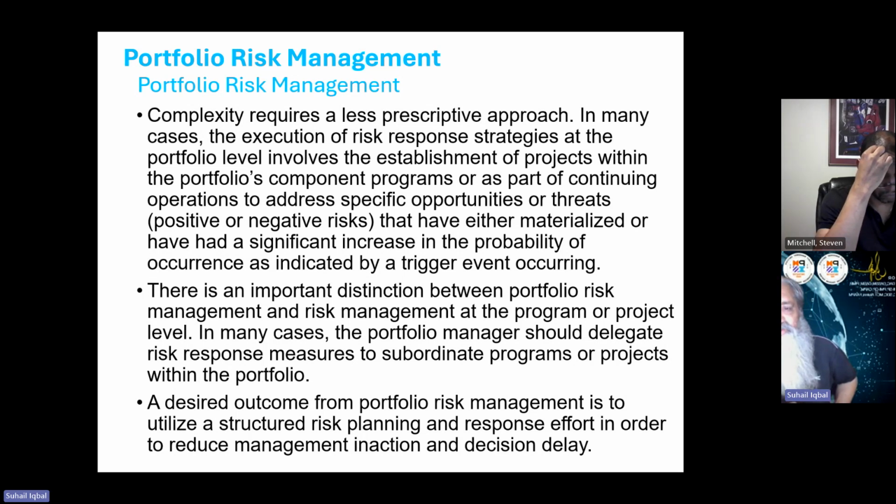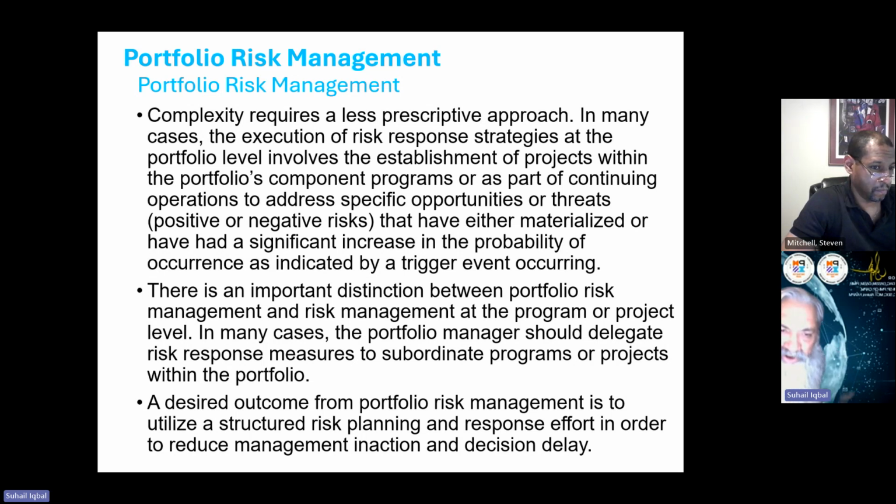In many cases, execution of risk response strategies at the portfolio level involves the establishment of projects within the portfolio's component program or as part of continuing operations to address specific opportunities or threats, which are positive as well as negative, that have either materialized or have had a significant increase in the probability of occurrence as indicated by a trigger event.